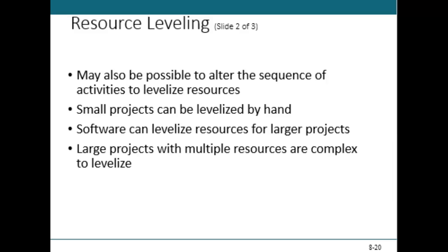Right? And so this scheduling calculation involves utilizing float or increasing and decreasing the resources for specific activities. What we're trying to do is make sure any peaks or troughs in our resource usage are smoothed out. This does not affect the overall duration of the project. It is also known as limited resource scheduling. Some of you may have heard it like that, right?